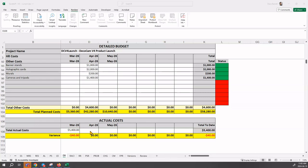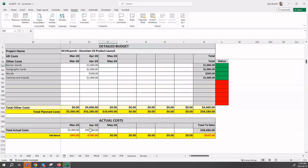A minus sign means over, so compared to $5,360. What was our results for the end of April? We gather this information and what we found is that we actually spent $43,060. We're $780 over budget for that month, for a combined total of $820 over budget. This is an issue.